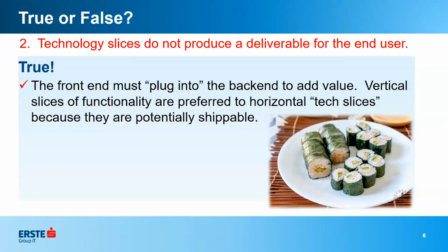If you would have a hard time taking what you want to do and translating it into a user story, it's most likely a task. Back end stuff is a perfect example. Something typically in the back end, if you do it as a story and you deliver it, typically has no value to the end user, right? And you would usually have a hard time wording it in such a way that it would make sense from an end user perspective. So it probably should be a task.